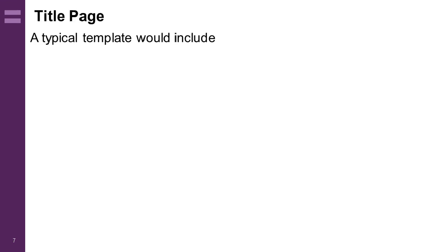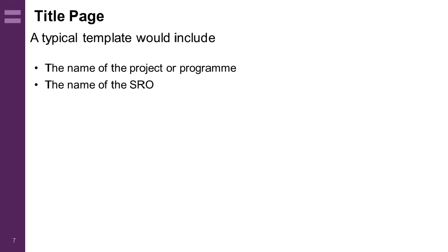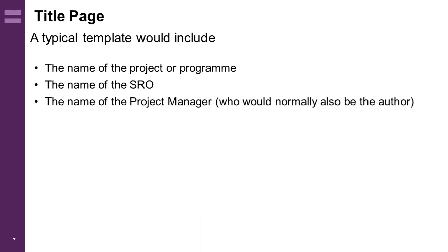The title page is a source of useful information. It not only conveys the name of the project, which needs to concisely state what the project will achieve, but also the key personnel, such as the SRO, Senior Responsible Officer, Management Lead, Project Manager, and if appropriate, there could be a technical lead or a finance lead.